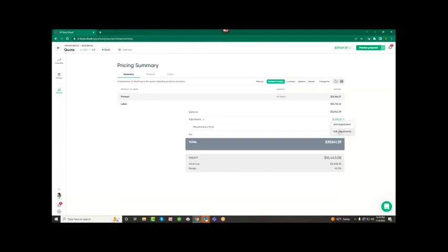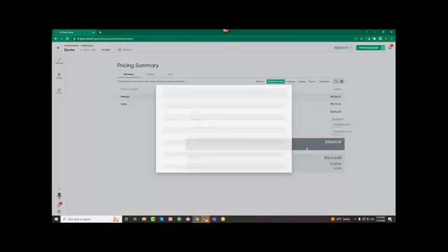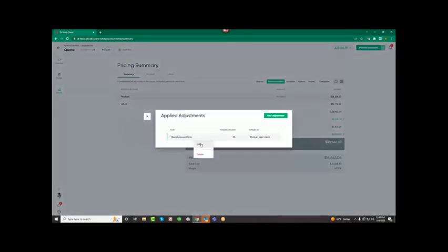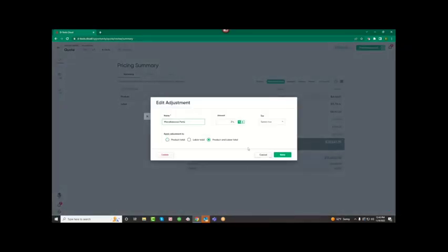So in this case, I have a dynamic adjustment and I have baked in 3% of my product and labor mix and just tack that on to the bottom line for every proposal that we share with the customer to make sure that we're capturing those zip ties and connectors and floor covers that Matt talked about there.